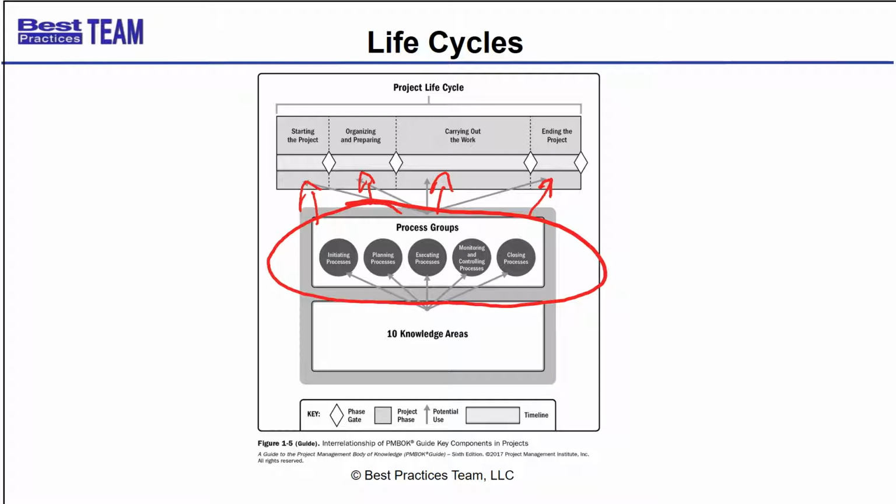How long is transition going to take for most projects? Well, for my smaller projects, probably transitioning just took days, took maybe a week. But for a very large construction project or a DoD weapons project, how long's transitioning taking? Months and months and months, probably more than a year. It's never going to end. And what's going to happen in this transitioning part of the project? We're going to realize we need to make improvements and changes.